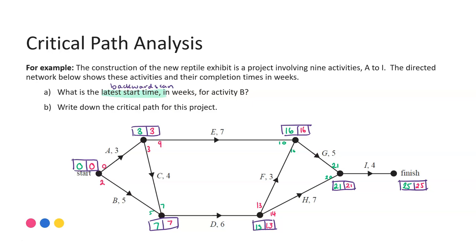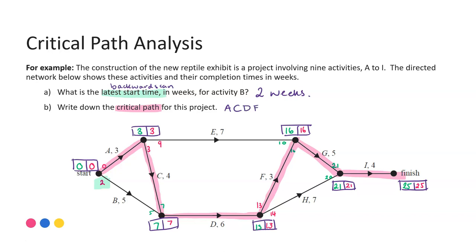The first question: what is the latest start time for activity B? It's really important that we've written those values on the edge, because the latest start time is your backward scan value for that activity - not what we put in the box. In this case, the latest start time for activity B is two weeks. For our critical path - the sequence of activities from start to finish where there is no float time - A was the activity that gave me zero as the latest start time. C was the next activity with the lowest latest start time. From here, D is the only option. F gives me the 13 that went in the box. G is the only option, then I. So the critical path is A, C, D, F, G, I.